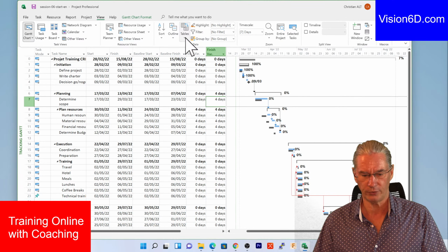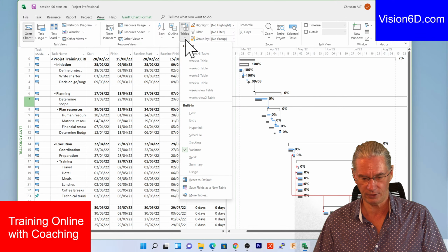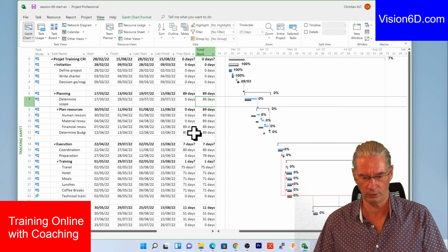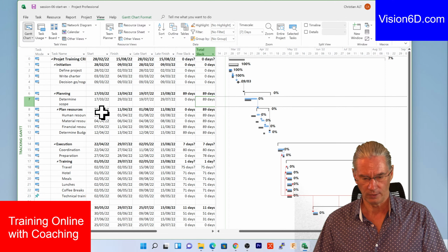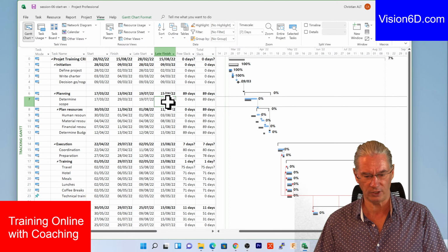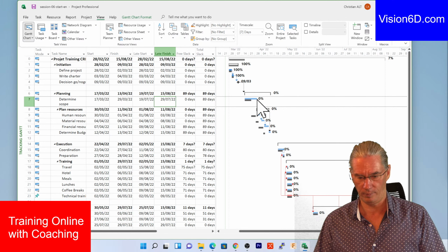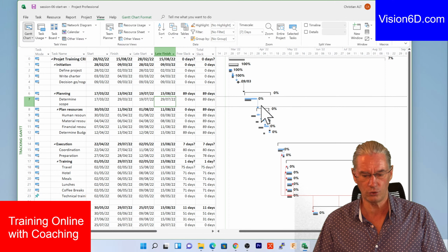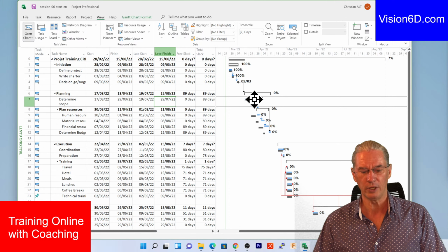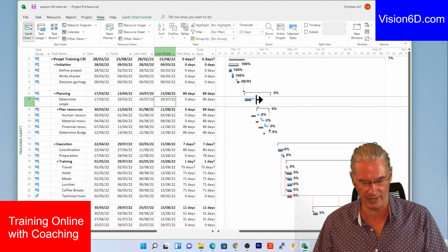So now I'm going to take again here the table of the schedule that we see. In the table of the schedule, we see that within the dates that we have here, we had a late finish for this task that could be in July. With our prolongation, we are still in March, so there is no issue. No other task has become critical due to this delay.